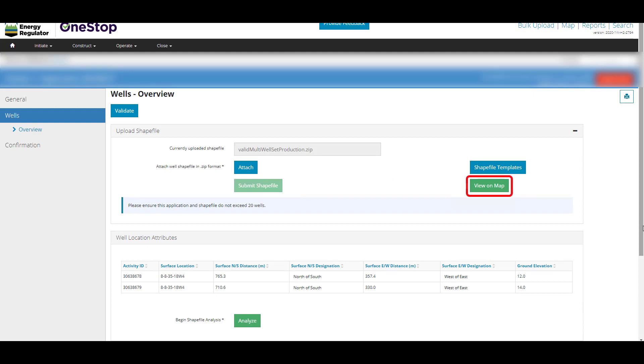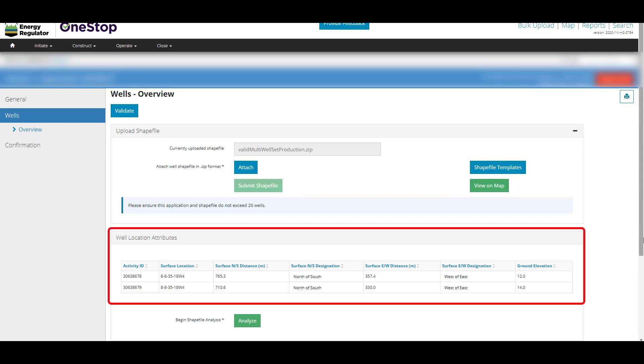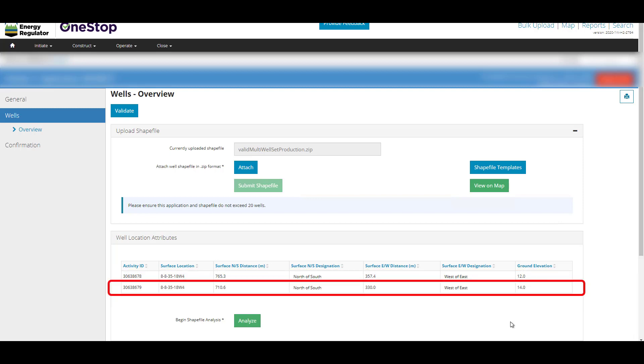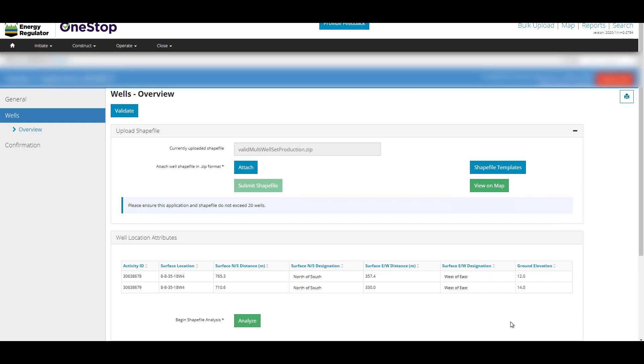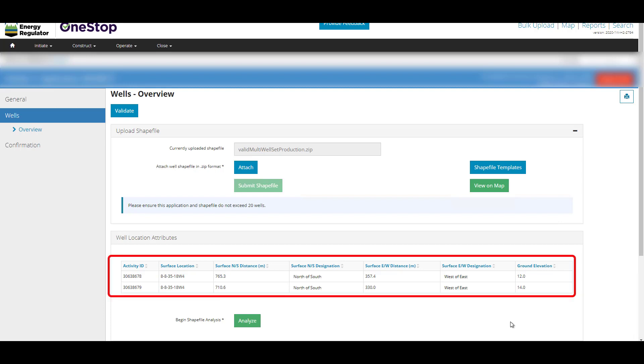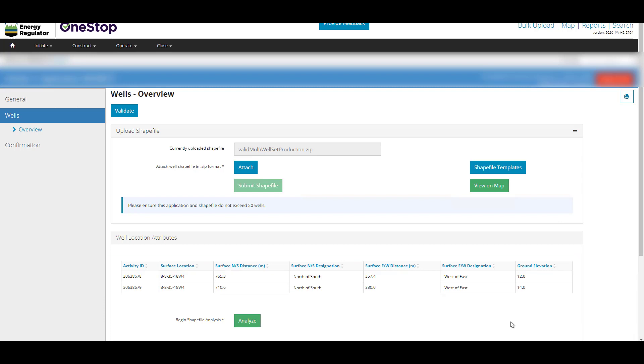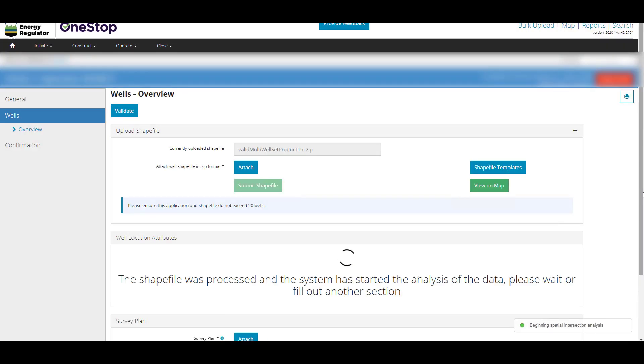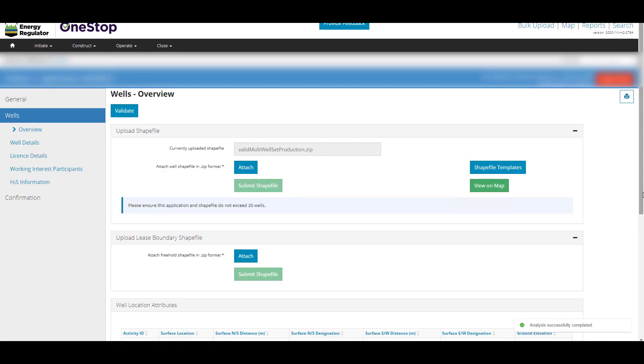Click View on Map button to see the location of your well on a map. Once the shapefile has been uploaded, the well information appears in the Well Location Attributes grid. How many wells are displayed is reflective of what has been read from the shapefile you uploaded. If this is a multi-well application, all well information contained in the shapefile will be displayed in the grid. Each well will be assigned its own Activity ID. Ensure all wells you expect to file as part of this application appear in the grid. Click the Analyze button. A message displays on the lower right-hand corner of the screen to confirm the analysis has been successfully completed.